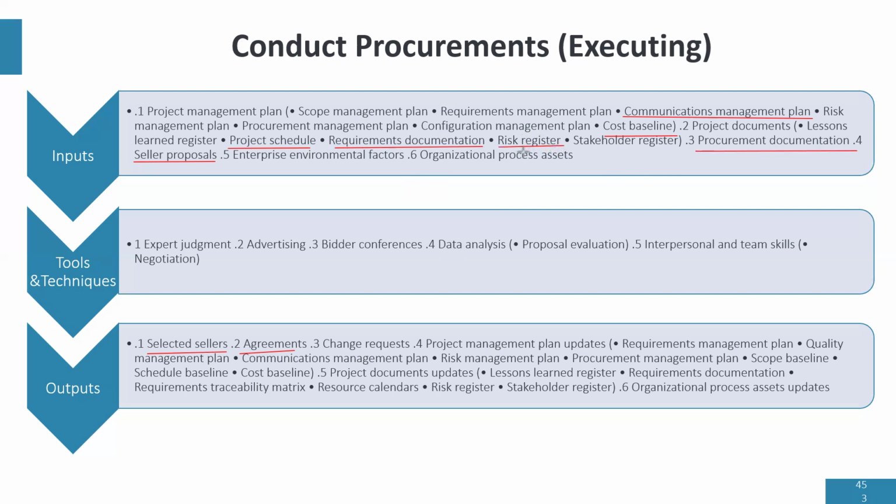Some of the project risk will be outsourced. Remember, risk response to negative risk: avoid, transfer, mitigate. Transfer means you are outsourcing that part of your project because of risk.